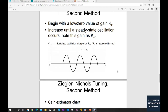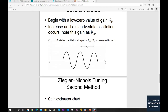If you work on-site, sometimes your process cannot produce this oscillation — for example, for temperature or pressure systems. That's why I used a couple of videos before to introduce that if you have a model of the process, you can use this simulated model as your process, as your controlled object. Then you can tune this Kp, increasing K from a smaller value to the value when the system gets this steady-state oscillation — without any impact on your actual system. That's the beauty of using the simulated object.